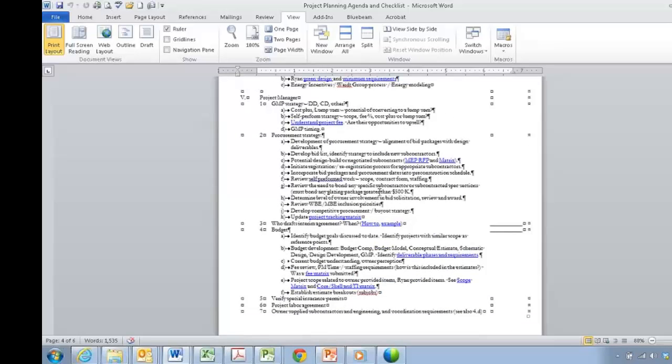Then the planning session has some of the things that relate in this checklist for the project manager. The GMP strategy. As I like to say, this is the point where we determine when do our numbers become hard? When are they locked in? And that goes back to ultimately understanding your business deal. Now, when you start this process and effort, that may not be known, but then it provides the precipice to have that discussion and understand the tenor and the nature of the contract you're going to sign.